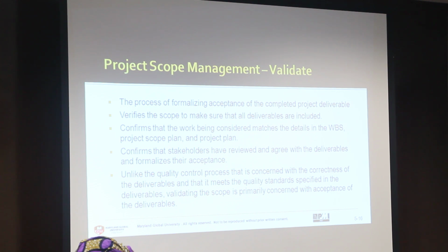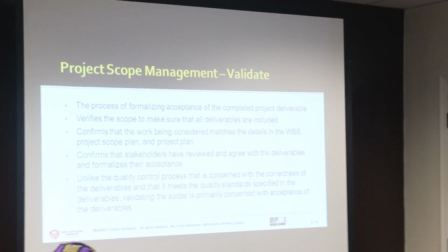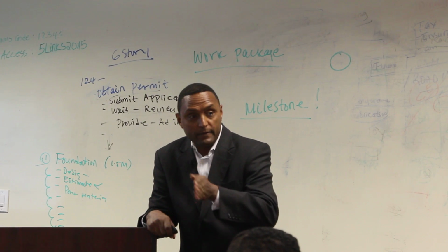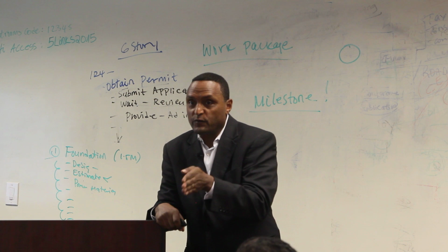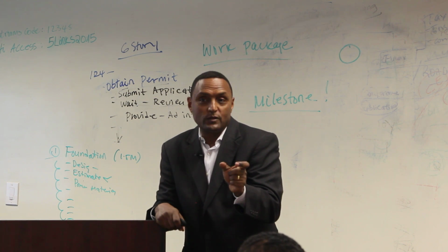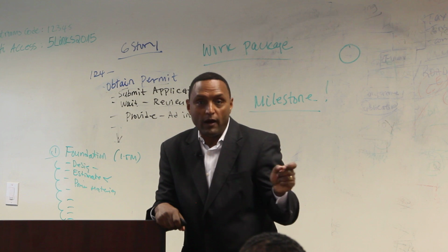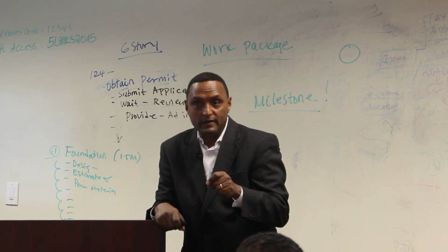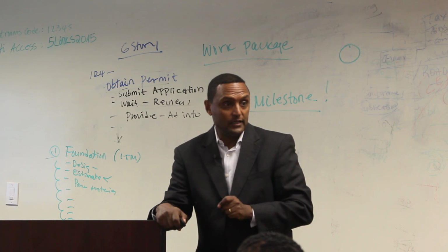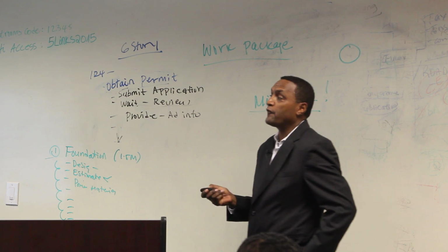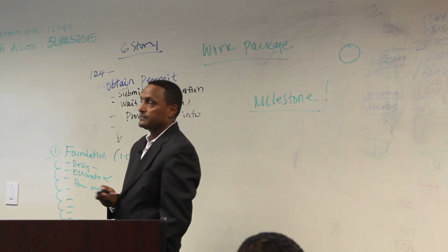Because sometimes, when you have several iterations of requirement analysis sessions, your boss sends 3, 4, 5 different people. So for the entire requirement gathering, you'll have 5 people. Each one of them comes at a specific area, and they only know one. So in that case, unless you have a written statement from each one of them, because you have to validate that, okay, this is what you want and this is what you get. So it's always good to confirm the stakeholders reviewed and then agreed.